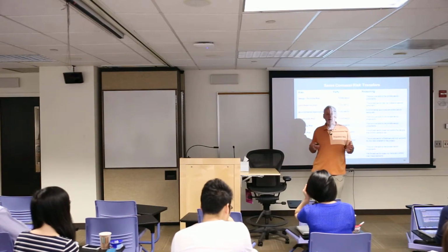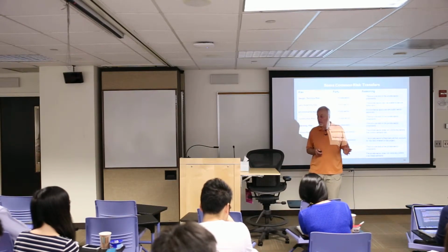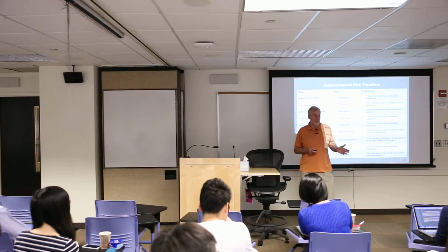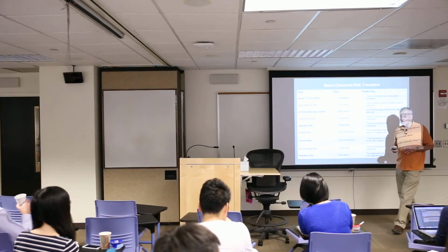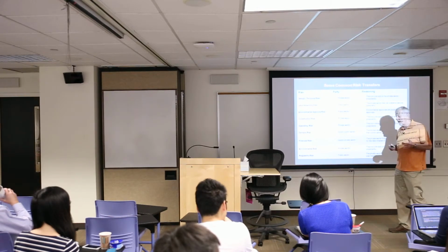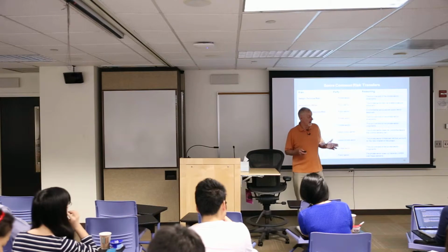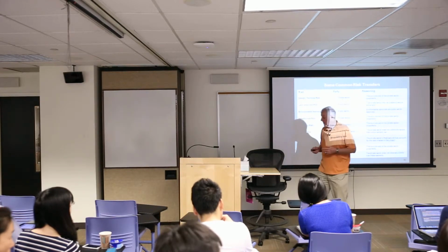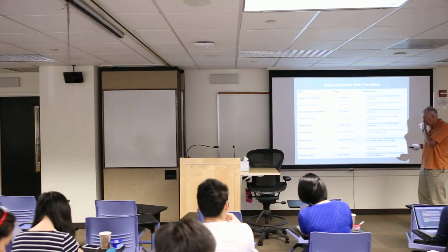It shows you how demand is driven in the public sector, often by policies that sometimes are legitimate, sometimes they're not. So the private sector really isn't going to get involved in that. The public may say the demand for the highway is this, and then something happens, they don't close the alternate route due to political pressure, and demand disappears. So demand risk should be mainly on the public.